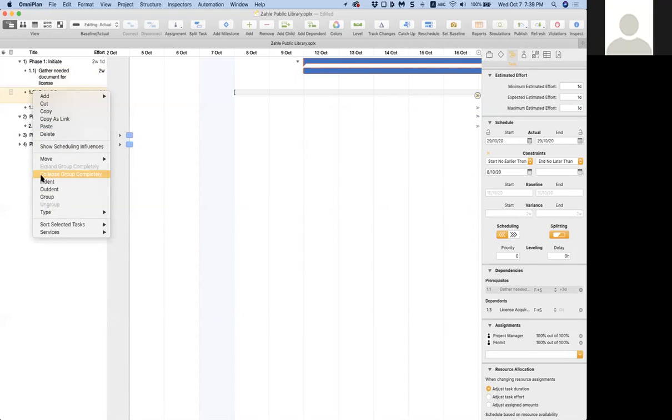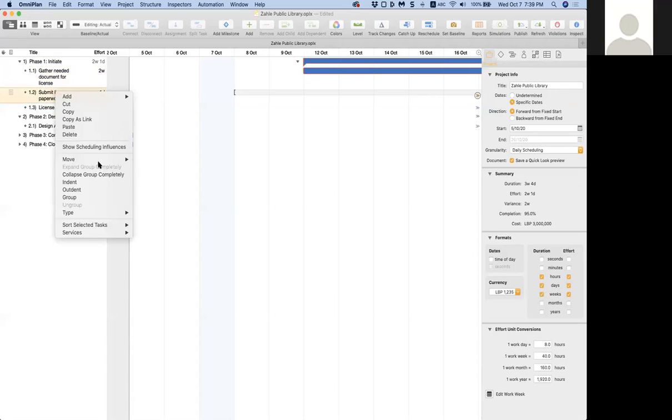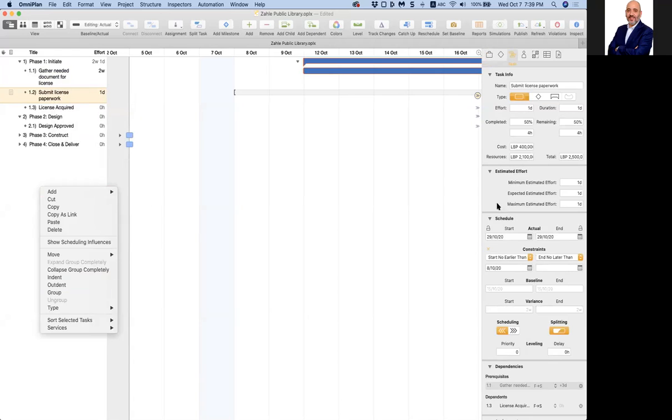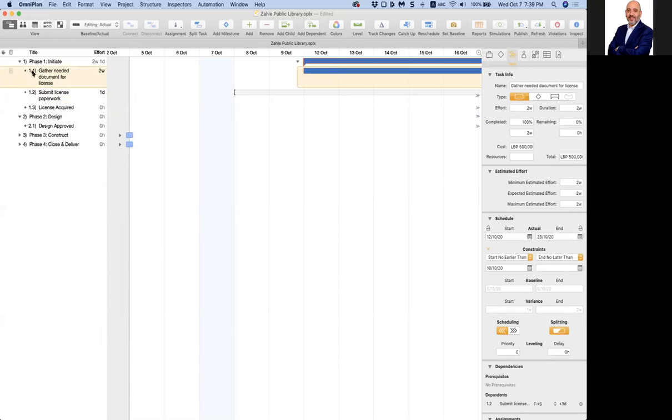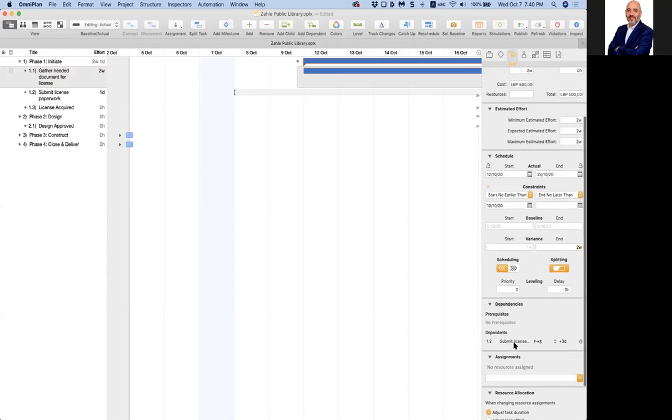يس سوري schedule variance كيف طلعت نيجاتيف؟ ما لانه تاخرت بالستارت وتاخرت بالفينش. اوكي بس انا حاطط لها اماونت على الستارت والهولدن. ما انت هاي كان المفروض تبلش ب 5 اكتوبر وتخلص ب 9 اكتوبر مزبوط؟ اوكي قلت له اكشولي نحن بلشناها ب 12 مش ب 5 وخلصناها ب 23 مش ب 9. بس منين نجيب هالاماونت؟ يعني نحن شو حطينا شيء بسكجول ليطلع لي الاماونت؟ اي اماونت؟ نيجاتيف ماينس طرح البلان ديوريشن من الاكتشوال ديوريشن، طلعت ماينس 1 ويك بالستارت وماينس 2 ويكس بالاند، يعني ماينس 3 ويكس ديلي.